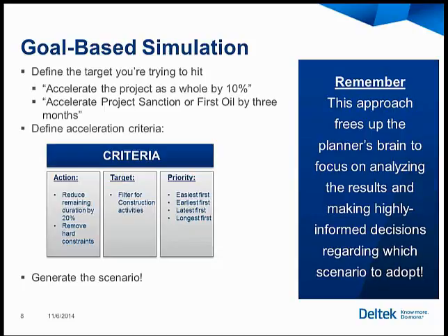Let's get the most work done earliest in the project, knowing we might have some constraints later on. And then easiest first: where are the areas of the schedule where we only have 1 or 2 activities going on that could be expedited, versus areas of the schedule that have 10, 20, 30 parallel activities where we would need to make changes just to accelerate a single day.